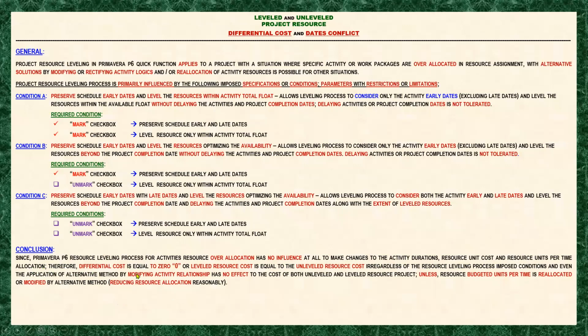Therefore, differential cost is equal to zero, meaning the difference of the cost of the leveled and unleveled project, or it is equivalent to the leveled resource cost being equal to the unleveled resource cost, irrespective of the resource leveling process imposed conditions.